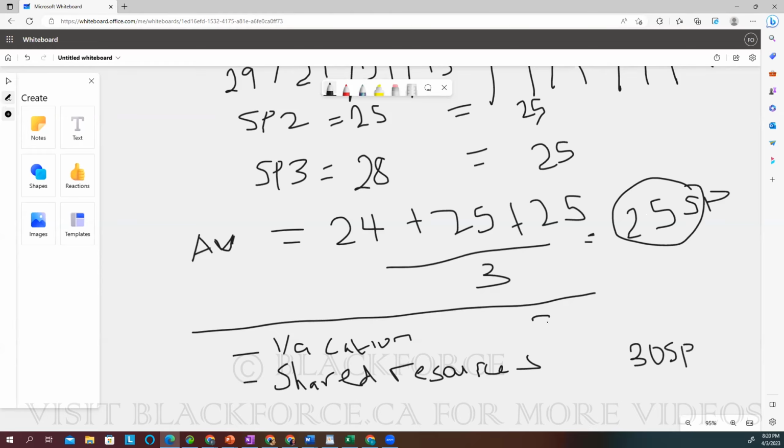Your story points in that sprint might be 20, right? So some teams keep tracking this average velocity over time. What this average velocity helps with is understanding the capacity of your team. So what this 25 is saying is that if everyone is available, no vacation, nothing, and we complete every point in time in our sprints, we will complete at least 25 story points.